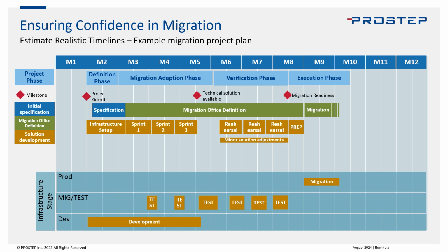Of course, you want to start after the project kickoff, where all stakeholders need to be available. You need to start a specification phase where the technical teams together with the business teams look into what actually needs to be done. During the discovery workshops, you won't go through every piece of this migration project, but here in the specification phase, you want to get deeper and establish the actual bits and bytes of the mapping and how you're exporting, how you're importing, things like that. In parallel, you're setting up the infrastructure for the team so that they have access to the corresponding systems, that the virtual machines are available, that the VPNs are available, and so on.